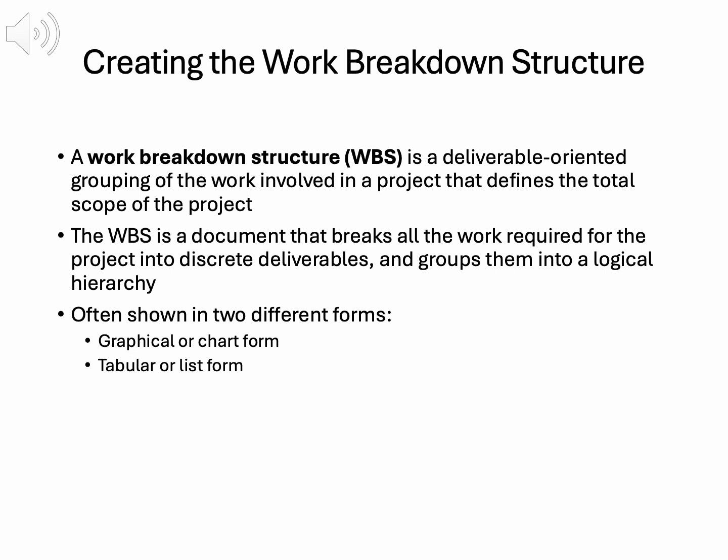For the just-in-time training project, the WBS includes deliverables like needs assessments, course materials, and pilot courses, ensuring nothing is missed. The WBS is presented in two forms: graphical, like an organizational chart, or tabular, as an indented list. The graphical form visually organizes deliverables, while the tabular form lists them hierarchically. Both clarify the project structure, making it easier to plan schedules and costs.